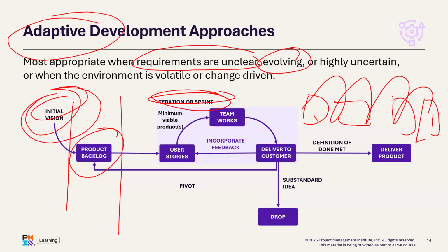In the adaptive approach, or the agile approach, the duration or the time period during which any component of the product will be built should be between 1 to 4 weeks. So the sprint length should be between 1 to 4 weeks.